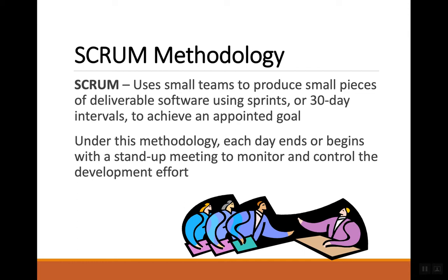Each day, the team, which is made up of both developers and end users, follows particular techniques within Scrum around orchestrating meetings, beginning of day and end of day meetings, tracking, monitoring, communication, and feedback, all part and parcel of building things on an incremental basis and adjusting as you go. So you avoid the total commitment up front, and you develop it as you go along.